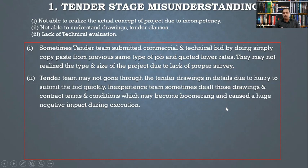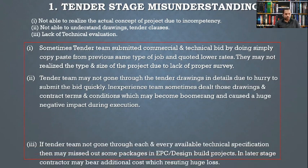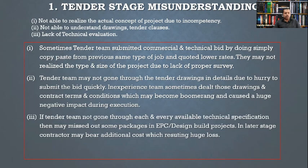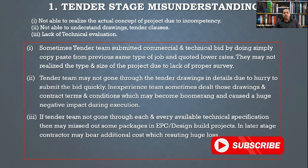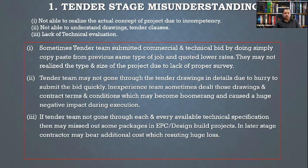Inexperienced teams sometimes deal with drawings and contract terms and conditions that may become a boomerang and cause a huge negative impact during execution. Additionally, if the tender team has not gone through each and every available technical specification, they may miss out on certain packages. In EPC and design-build projects, this can put the contractor in a very difficult position at a later stage.